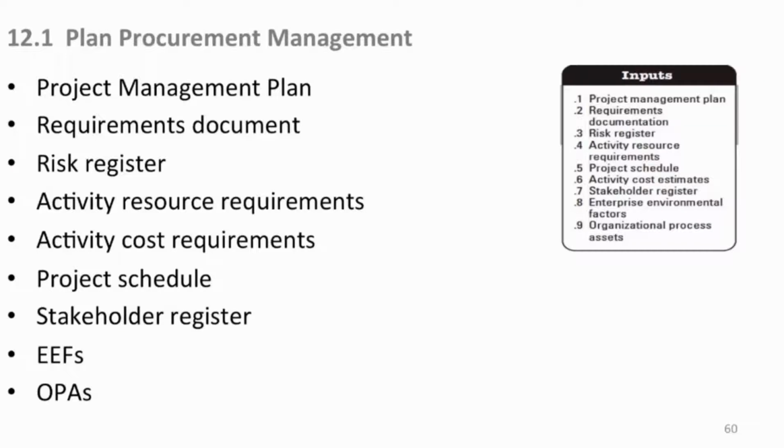Activity resource requirements, again: the WBS is broken down into very discrete work efforts with costs, resources, and time associated, which are translated up, sometimes aggregated a bit, and brought into your project network schedule diagram as activities that have been sequenced with your finish to finish and start to start, and then you put arbitrary leads and lags so it adjusts and morphs to what you need because you may have constraints somewhere. And then of course the resource part of it is the human resource or the materials that you need to accomplish that item.